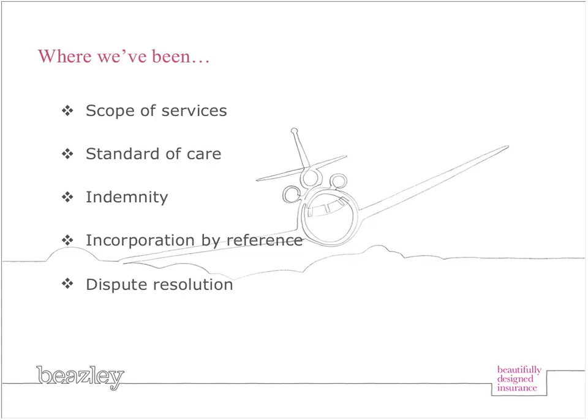Incorporation by reference. This is inherently a risky proposition because any document that is referenced in your agreement as being incorporated into your agreement effectively is stapled to your agreement. So anytime you see language saying something is incorporated, you must make sure that you obtain that document, read it, and make sure that it's acceptable. Lots of times a prime agreement will be incorporated. That's probably the most common thing. And there may be provisions in that prime that are either inappropriate or inapplicable to you.